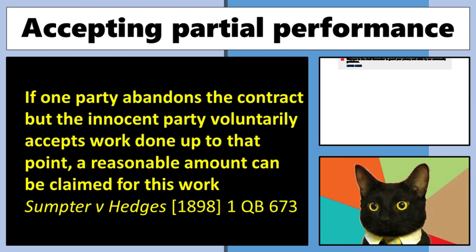And that's different, by the way, from those earlier ones, when I talked about this doctrine of substantial performance. This will happen for you guys in your life, and I've seen this go absolutely terribly pear-shaped with my father's business, about 20 odd years ago, where he was advised, just pay what you think it's worth. No. Don't pay what you think it's worth. Pay what a reasonable person would think it's worth. Because they'd end up going to court, and my dad actually lost. He lost a substantial amount of money as a result.